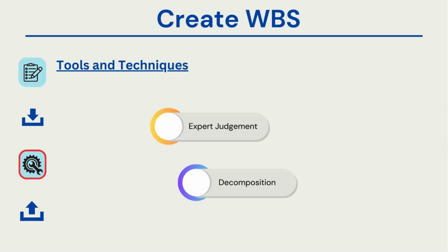That is the rule of 40 that is often followed, but it could vary, ranging from 40 to 80 hours, something that we can estimate and easily track. This also helps in providing inputs when estimating the schedule and budget. Expert judgment is another approach. We can engage subject matter experts, SMEs, to get their views.